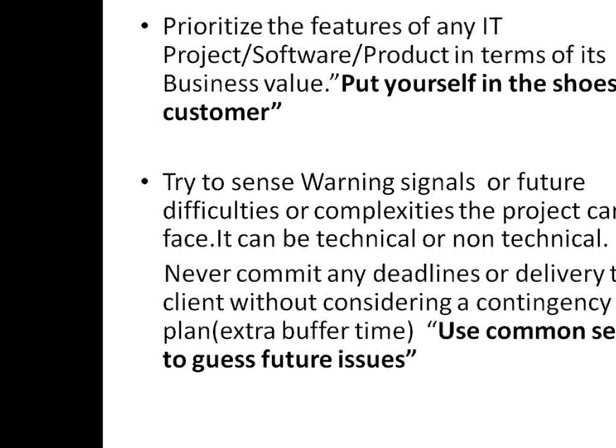The other thing is that once I know the warning signals, then only I should commit on some deadlines. I should never commit something to the client without having a contingency plan. See, in the SDLC, we always say that there should be 5 to 15% buffer time kept for any contingency for the risk management.